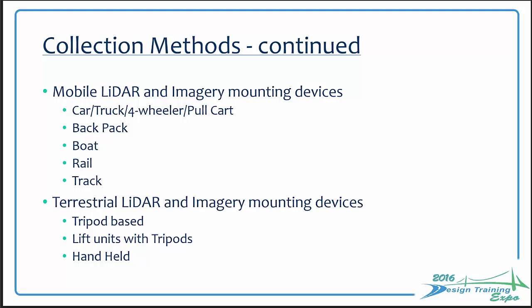The same applies to rail — there are multiple solutions depending on what you want to do. You can mount on a rail system. I was involved in one job 900 kilometers long in Brazil, and we learned a lot of lessons about leapfrogging with GPS and ensuring — probably having duplicate GPS differential — as you scan down a corridor. One comment: trusting VRS, CORS, or using OPUS without your own differential GPS can sometimes be dangerous. Redundancy is something I consider almost mandatory.